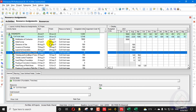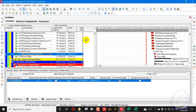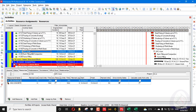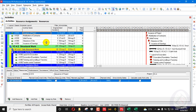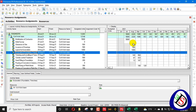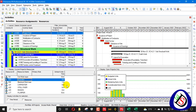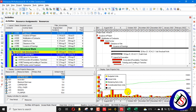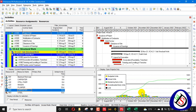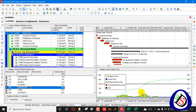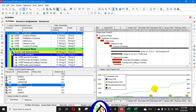After importing, you will see resources are being allocated to this project. The import was successful. Now we can see a total of 12,283 budgeted units. When we go to Activities, all activities are assigned with resources. In the Resource Assignment view, you can see all project resources assigned, and the allocation graph shows all resource allocations — some are over-allocated.